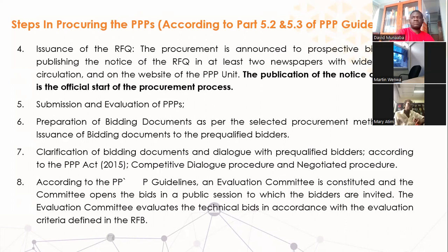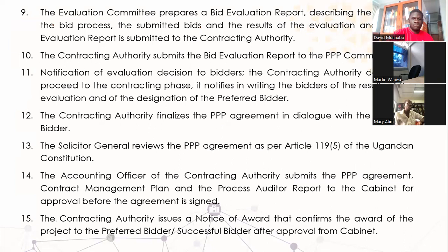Then according to the PPP guidelines, an evaluation committee is constituted. This committee will open the bids in a public session to which the bidders are invited. The evaluation committee will evaluate the technical bids in accordance with the evaluation criteria in the request for bids.